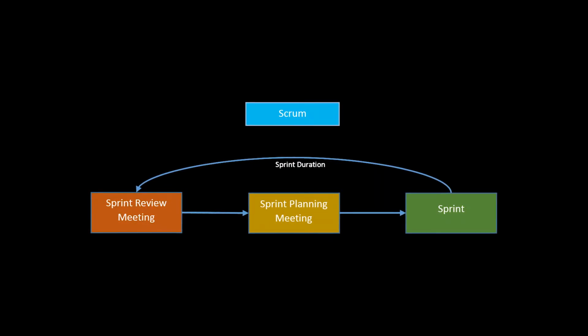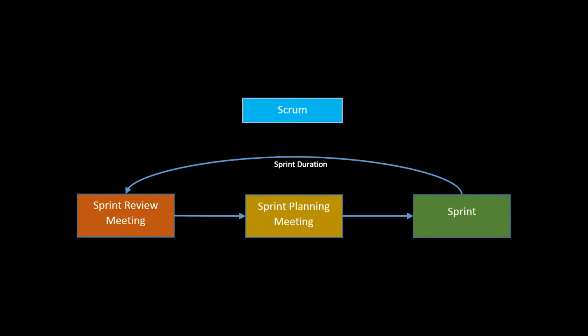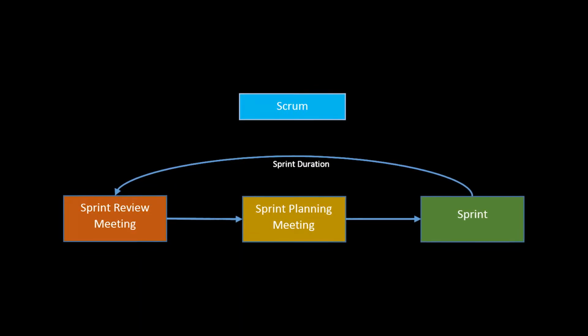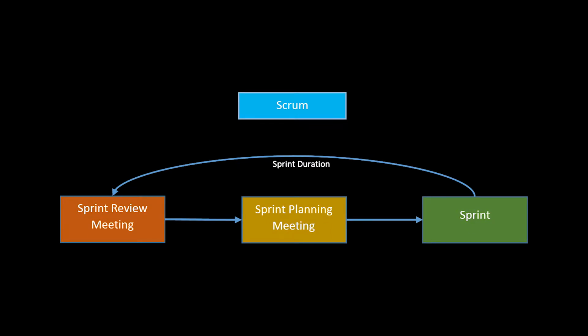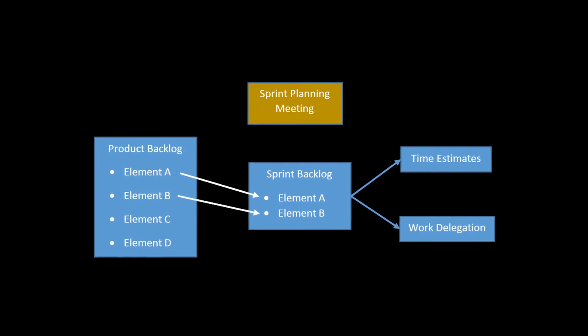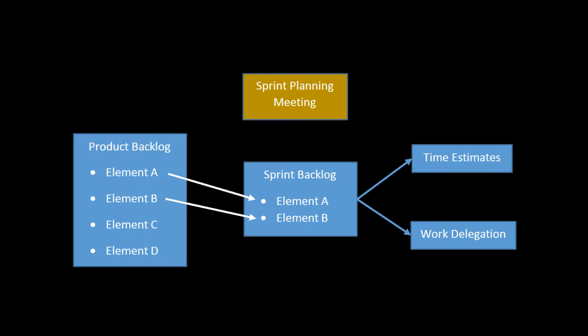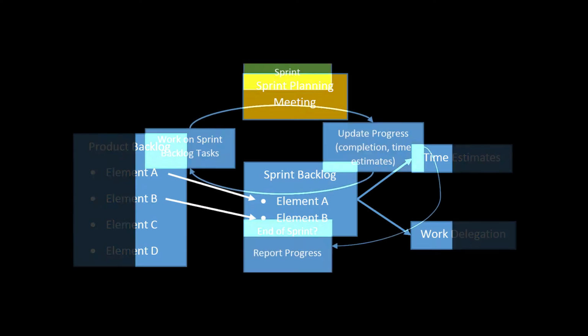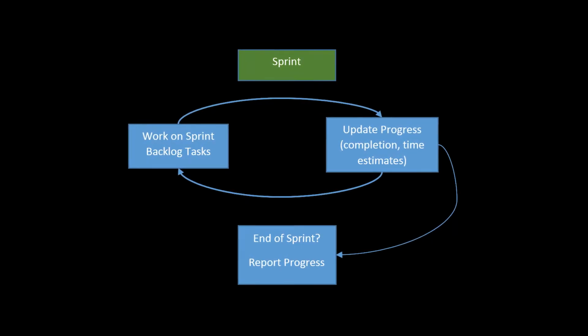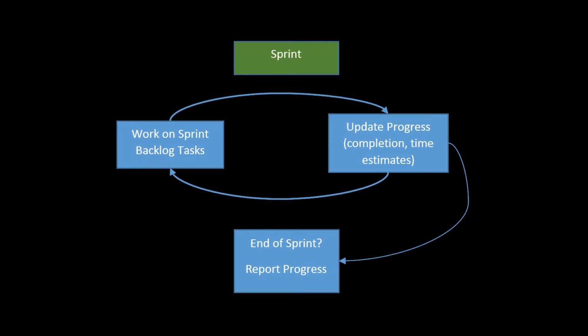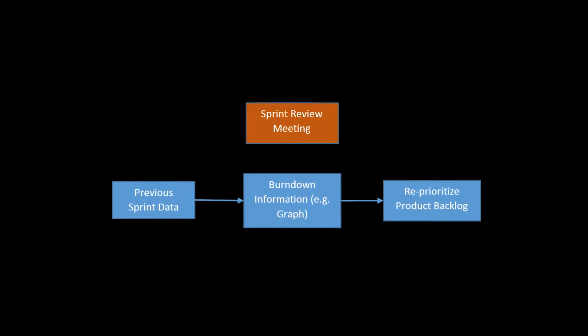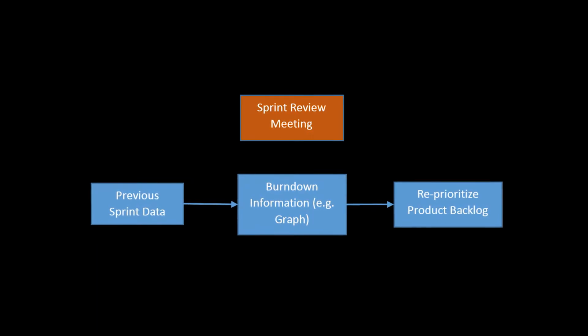To ensure your game achieves its goals in a timely manner, your game is developed via an iterative or repeating process of working on the most important aspects of your game for the current cycle or sprint. A backlog of elements to be included in your game is kept, ordered by priority, and implemented over the course of multiple sprints. The time taken and efficiency of tasks is kept track of, affecting the time and resources spent on game elements in the next sprint. Anything outstanding or overdue from a previous sprint gets much higher priority, and consideration for the next one until it is complete.